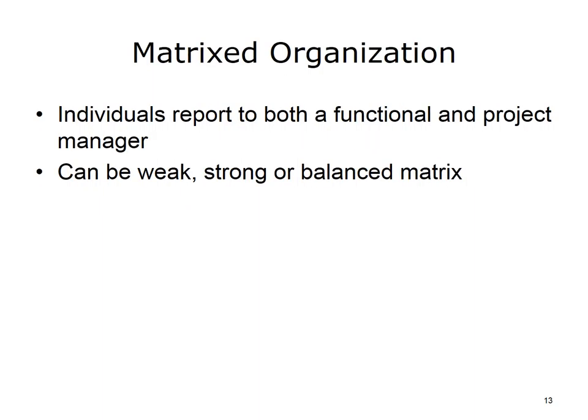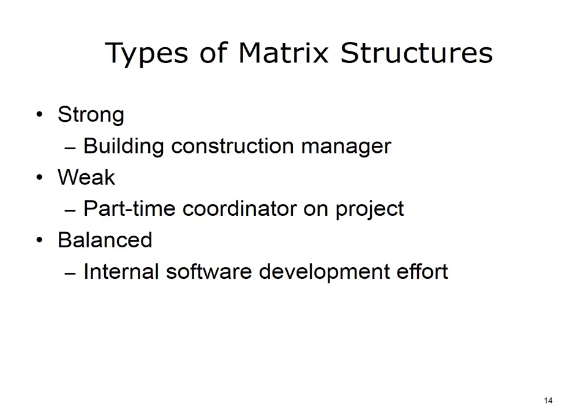In a matrixed organizational structure, the project resources—that is, the people working on the project—have a departmental or functional manager and also report to a project manager. The leadership or authority in the matrixed organization is shared between the project manager and the functional manager. There are three sorts of matrix structures: weak, strong, and balanced. Let's clarify what is meant by a strong, weak, and balanced matrix.